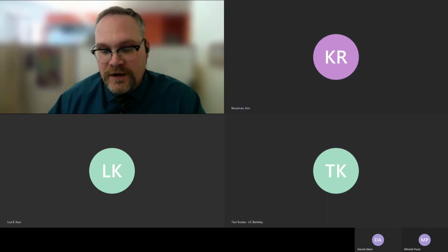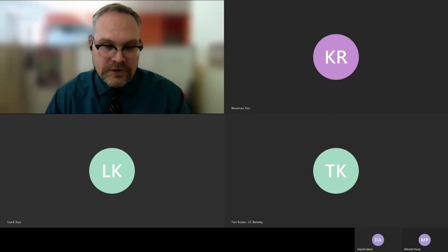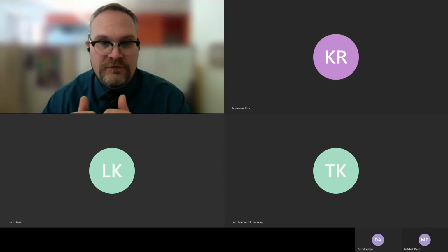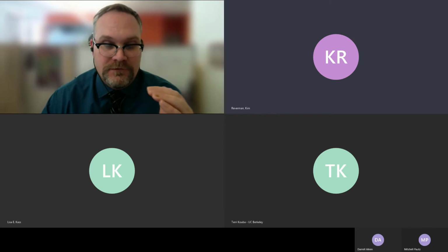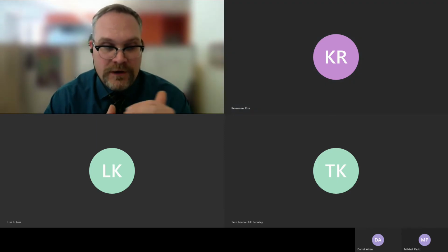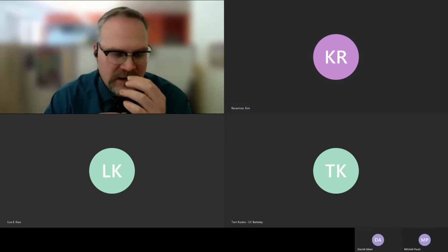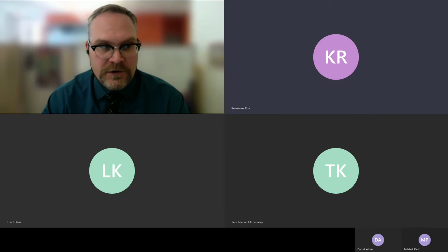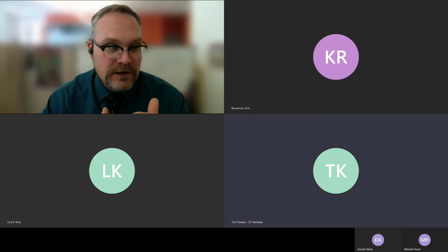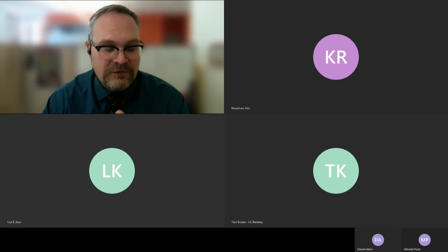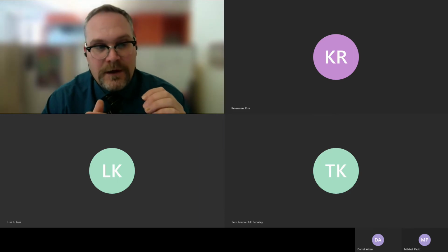We do track their time for paid time off, but we don't really care. It's not like HR, so we don't care if it's vacation or sick or whatever. We just want to know it so we can reduce it from their capacity for resource allocation, and so we know, when we're doing resource planning and forecasting, how many people we have. None of our HR solutions like Workday or PeopleSoft are really tracking billable type hours like you would for a project or an engagement, but they do track your vacation requests or your bereavement or your jury duty or something.